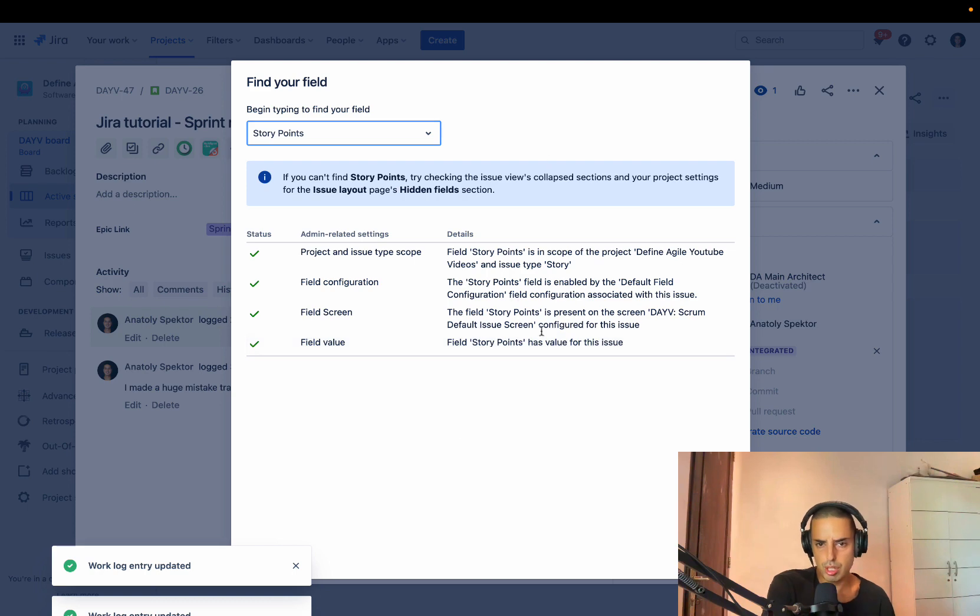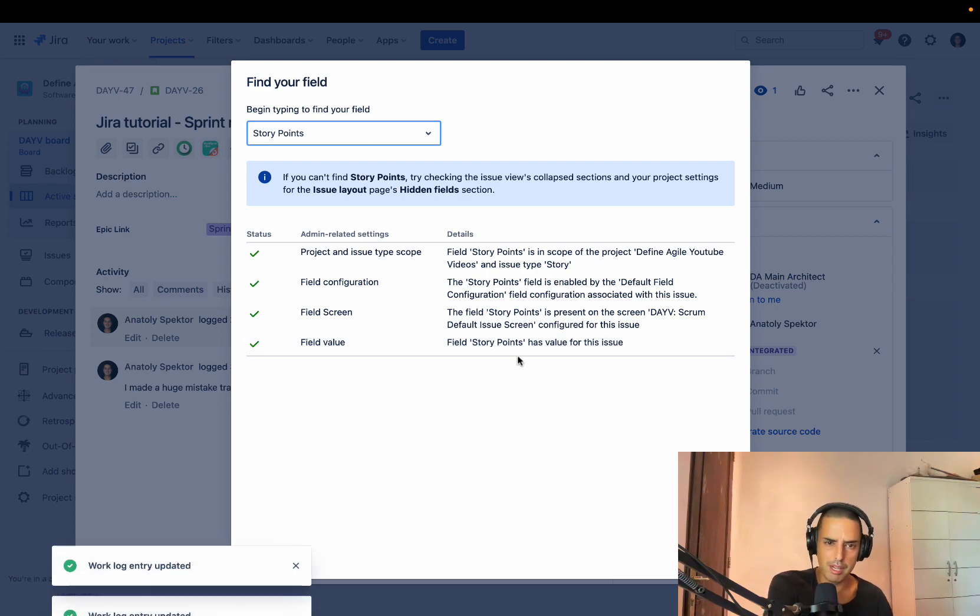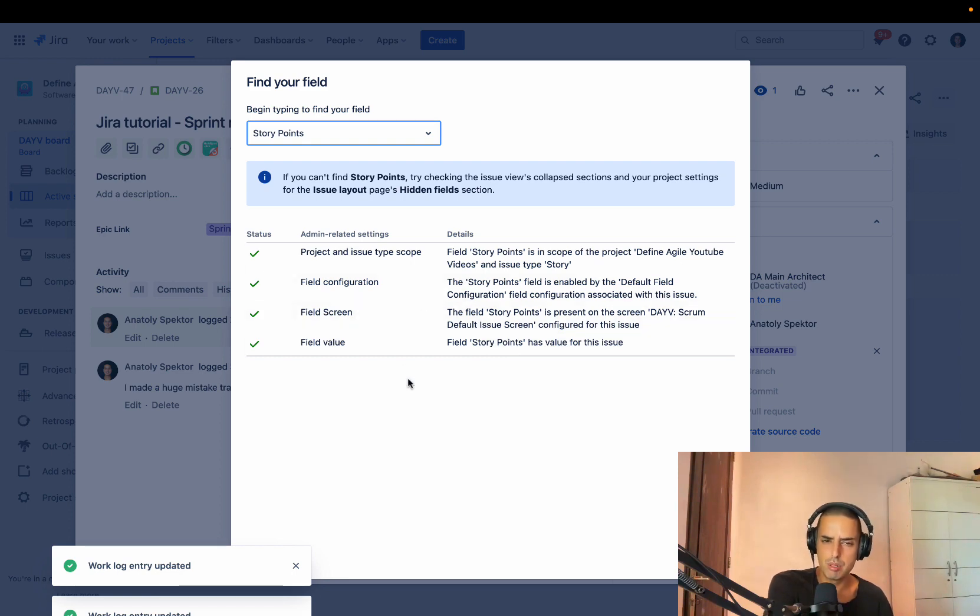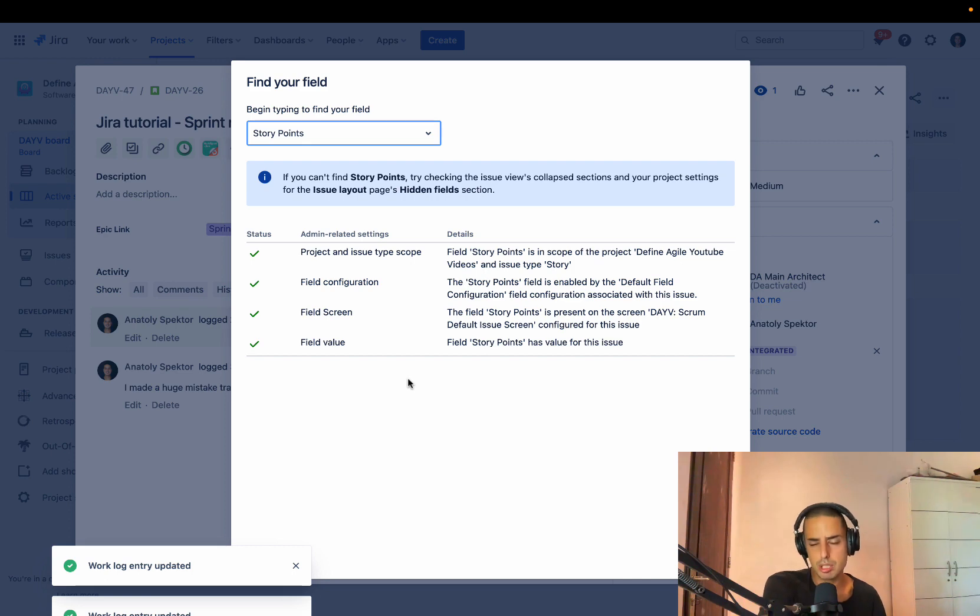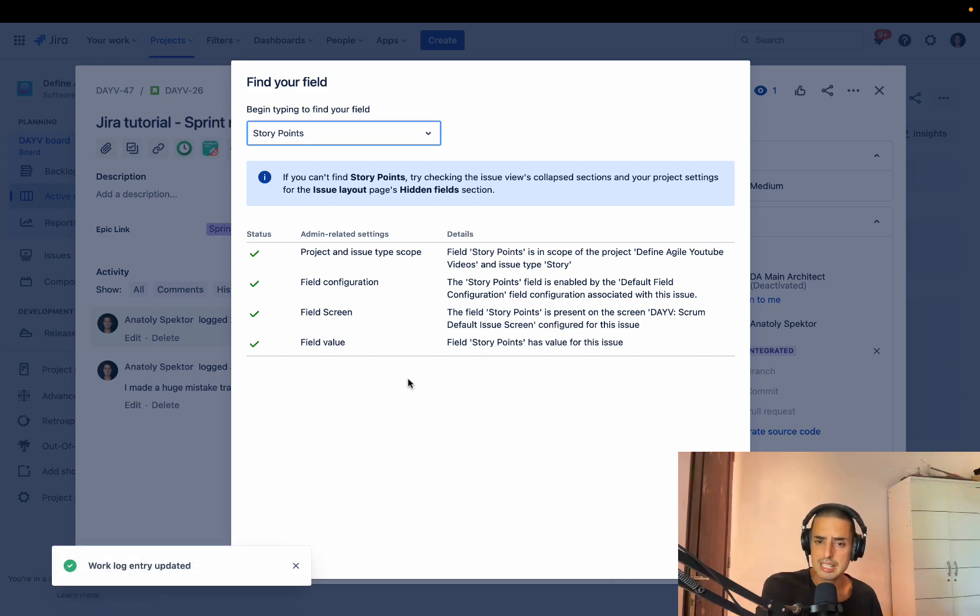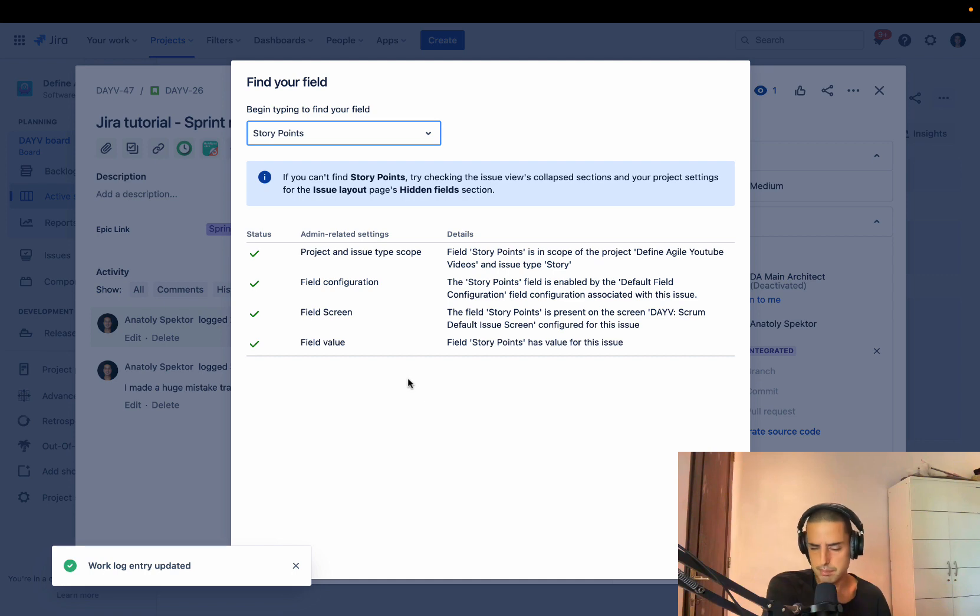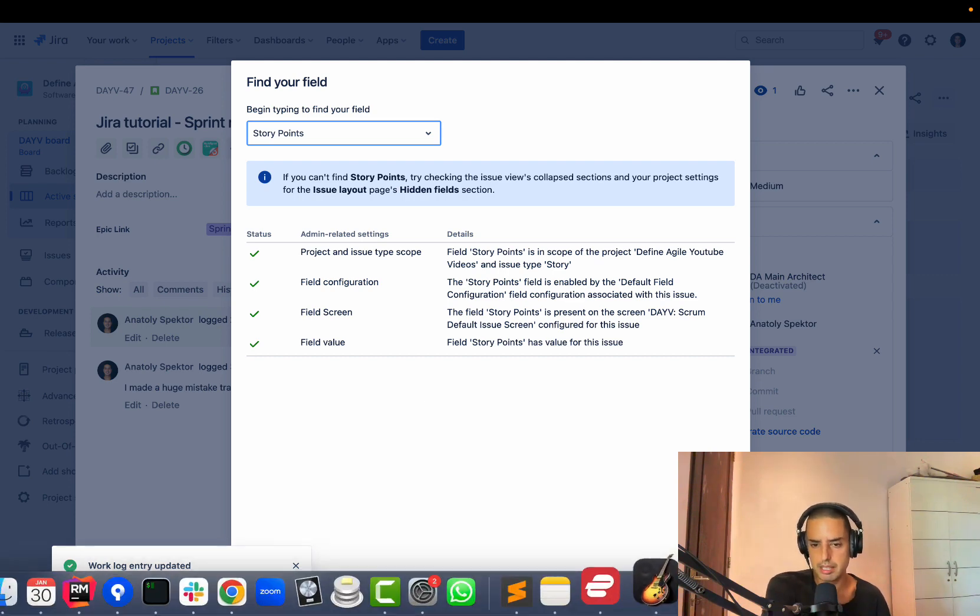They will show you where it is or why it is not there. Sometimes you might make a mistake in your screens and you will not see them, but usually by default, if you're using Jira Cloud, your stories will have story points. Tasks might not have story points. So you usually estimate stories. You do not estimate tasks.